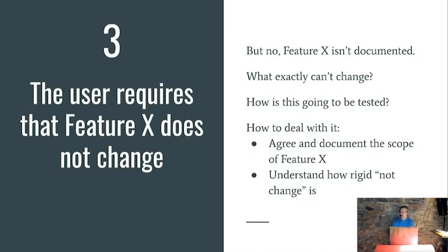And we also need to think quite clearly about what not change really means. Does it literally mean it needs to look exactly the same? Does it just need to perform the same functions in the same order? We don't really know without a bit more information. But constraints saying don't change this without further information are really unhelpful, and will end up with your new solution having to reconstruct behavior from previous versions that was never described properly in the first place.